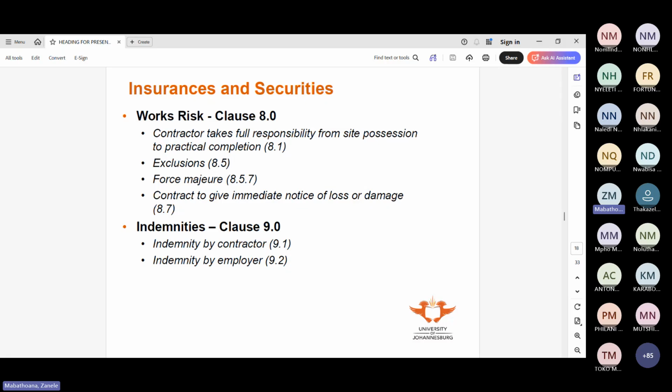Obviously, if your client is skimping on payment because he doesn't have enough budget, then something was not done right during the planning. There's a certain level of uncertainty that you have to allow. With building works, in real life, we only allow about 2.5% contingency, and this is when we've done the design, because everything happens on the surface.